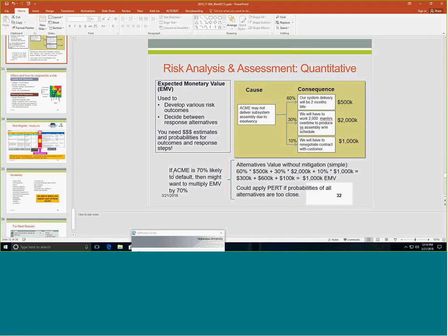And then you will want to multiply the outcome of this calculation with the estimated probability of that risk cost actually coming true, right?